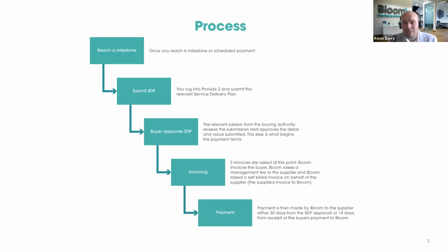From there, generally speaking, we have a payment process where the suppliers are usually paid within 30 days or 14 days from the receipt of funds.